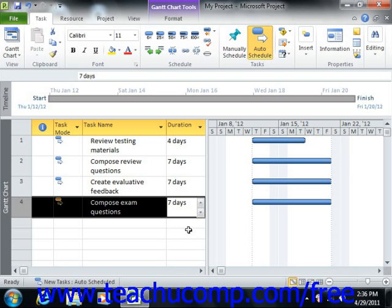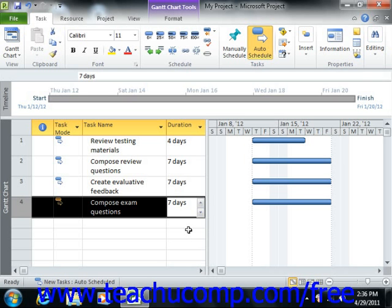Note that although this is a critical step, it is also a passive step that requires no active work. In this case, you can enter the task as an elapsed duration task, that is, one that simply occurs regardless of the working schedule.